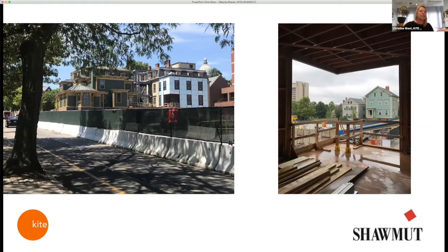So we had the foundation plan. Once we issued that, we issued part one, which was the shell and exterior, basically core and shell. And then we moved into the interiors and finishing out. So it was really broken into multiple packages in a very fluid kind of way. So, yeah, fast. I think we finished the drawings in November and started really serious construction around that time. And then we finished up a year later, with everybody moving in right after the Thanksgiving holidays last year. Well, this is really fantastic to hear.